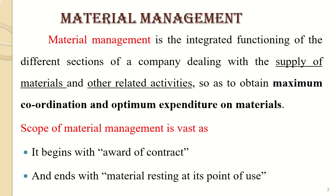The scope of material management starts with the award of contract and ends with the material resting at the point of use.